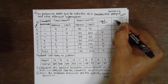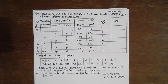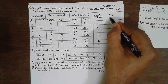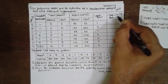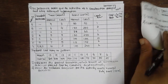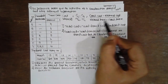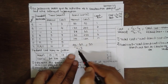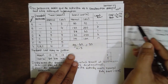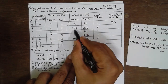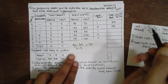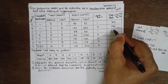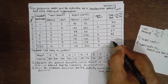Now for the cost slope. The formula is: (Cc minus Cn) divided by (Tn minus Tc) — that means crash cost minus normal cost divided by normal time minus crash time. For example: (90 minus 60) divided by (4 minus 3) = 30. Next: (250 minus 150) divided by (6 minus 4) = 50. The remaining rows follow the same procedure: 22, 50, dash, 30, 70.